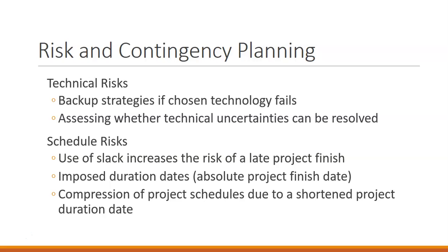We can also impose duration dates. If you remember a couple of chapters ago when I brought up the major construction project that was happening outside of the city of Ames on Highway 30, they had built into all of their contracts with subcontractors that any delay of the project would result in a fine to the subcontractor.